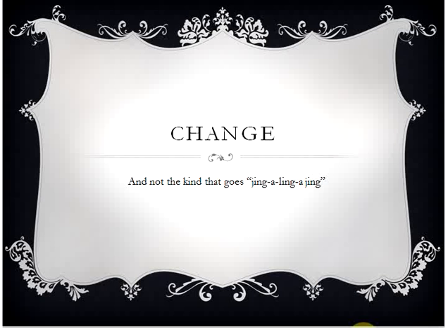In those cases, you need to have your own form of change control document, and I have several that I use with my clients. And I set that expectation. If they're going to test something for me, test a rule that we built, they need to be very clear if they're going to say it doesn't work, and they need to use that change control document to describe to me step by step how they tested it. I did this first, then I clicked here, then I clicked here, and I clicked there, and this is what I saw. They have to provide me with the test patient information.